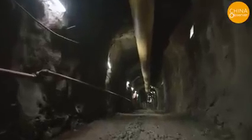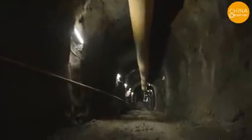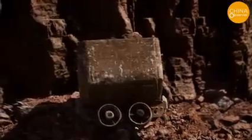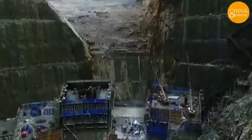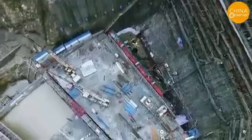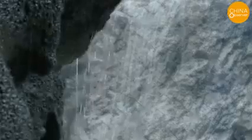The excavation encountered carbonaceous slate, and the rock has extremely low compressive strength. Although supported by section steel, the tunnel roof collapsed as high as 12 meters. Accidents had occurred during the excavation phase, and the rock body has poor integrity and low strength, but the rock body has not been reinforced. According to the design documents, the Eping Hydropower project has a construction period of 4 years. However, with the joint efforts of the owner, construction company, supervision, and design companies, the 4 major components of the project have been nearly completed in 2 years.